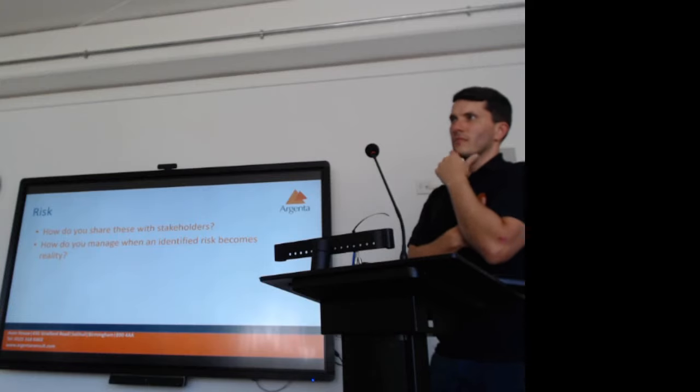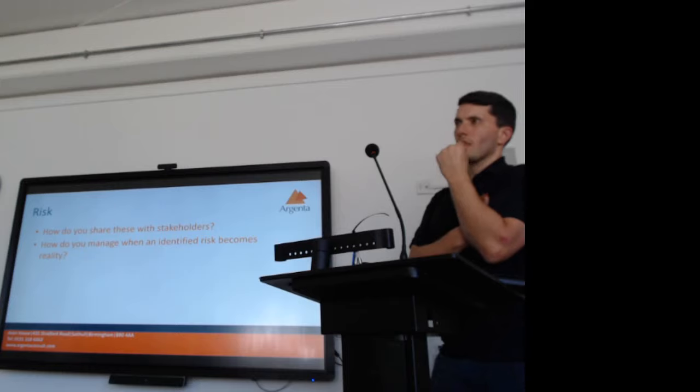I won't share the whole thing with the customer, but I'll share just to get your thoughts. Because I had one where we were migrating to a different processor family, and so that was an obvious risk. To be fair, I did some work up front that made me think it wasn't likely to be a risk. So instead we delayed that part of the project on the basis that we don't want to spend money on hardware until we know that there was a software component. If that failed, there was no point.